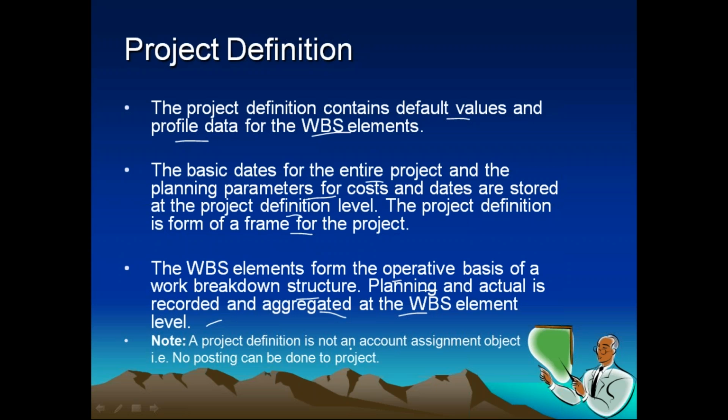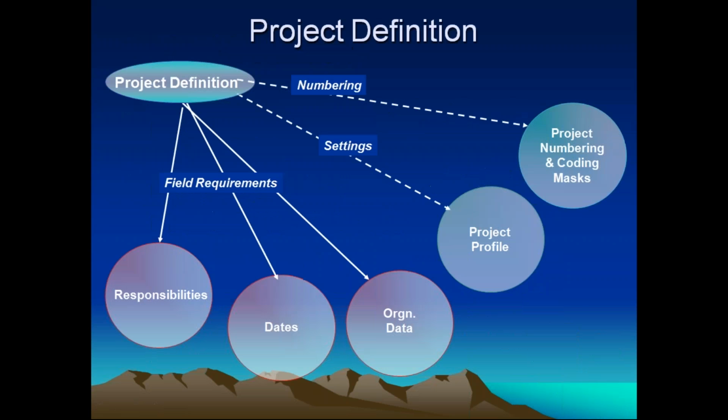The project definition is not an account assignment object, so no postings can be done to the project. At project level we are not doing anything. Only at WBS level are we posting. We are updating the information by using the WBS element level.